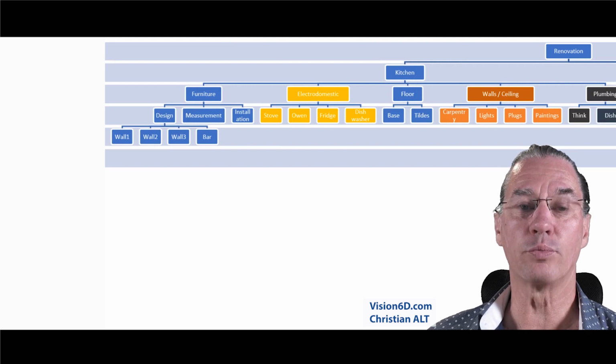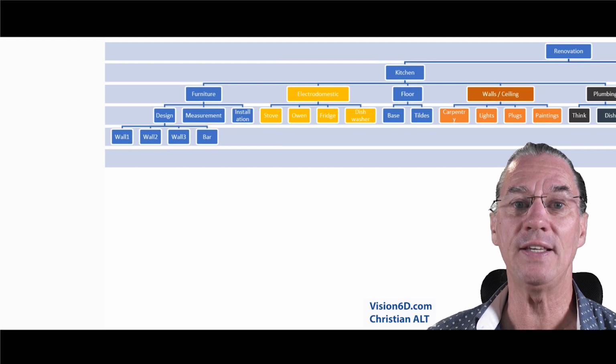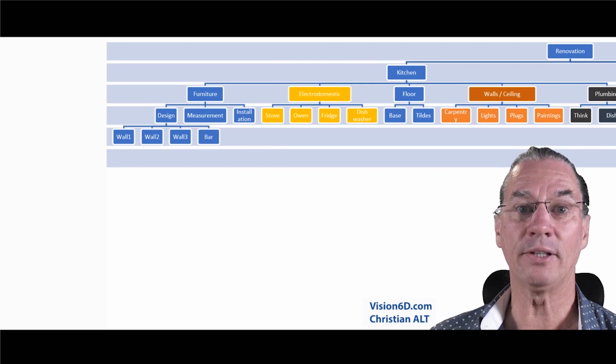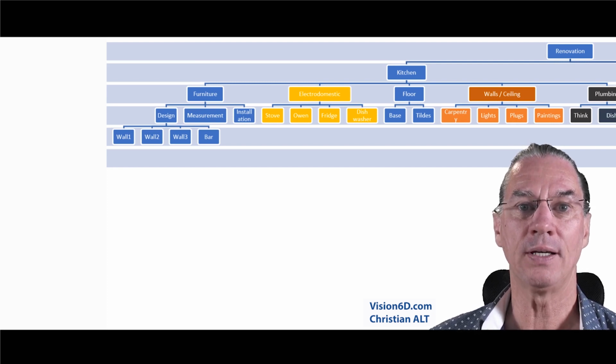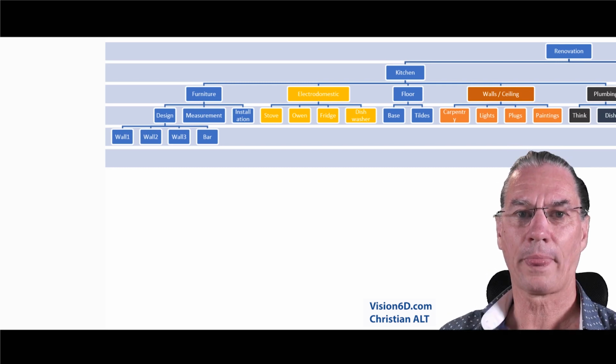With this, we've broken down a complex project into easier to understand components. Every element of the WBS is an end product, but we don't show how it has to be done and when it has to be done. This is part of scheduling that we'll look at in an additional video.